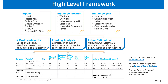For example, we need location-based inputs like wind and snow load, as you can see in the middle orange box showing different inputs by location that are required. These inputs determine the number of vertical columns and spacing required to support the tubing structure with the expected wind and snow load for a specific location. After all activities and inputs are figured out, the next step is to set up the calculation for each step and assign it to a cost bucket or category.